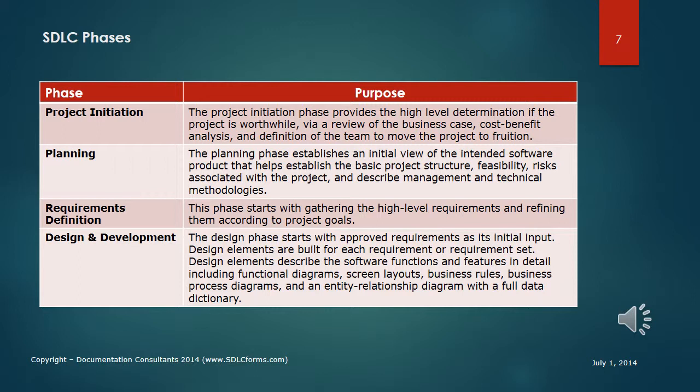Design and development. Once you have the business and functional requirements carefully defined, you will now move to developing systems requirement specifications and technical requirements. Many companies often bypass this important step, moving directly into development. This approach will generally work if the project is relatively small and you have seasoned developers who can interpret the business requirements and develop applications in accordance with rigid department standards. However, if your projects tend to run from medium to large, you run the risk of developers not being fully aware of all system requirements, necessitating costly rework downstream.